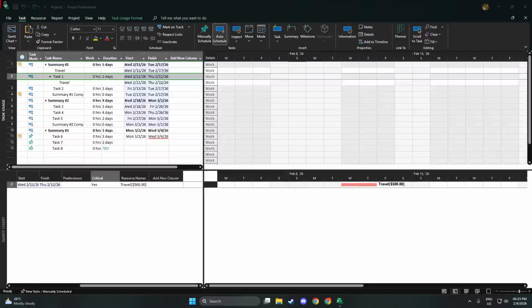In today's video, I'm going to teach you how to add multiple projects into Microsoft Project. We'll start inside Microsoft Project. You can either open an existing master file that will contain other projects, or create a new blank project if you're building that master from scratch. A master project is simply a container that brings several separate schedules into one place, so you can see them together and manage them more easily without merging the original files.